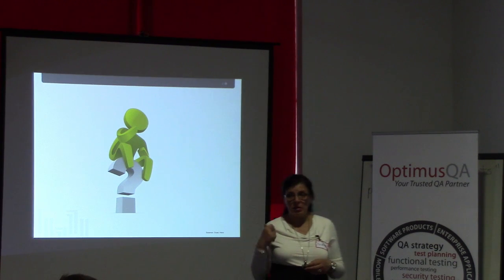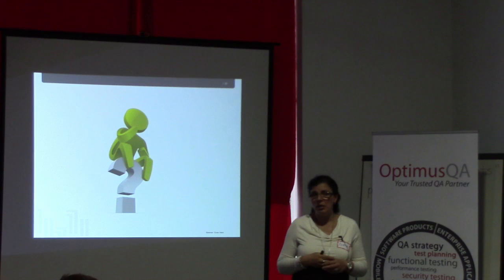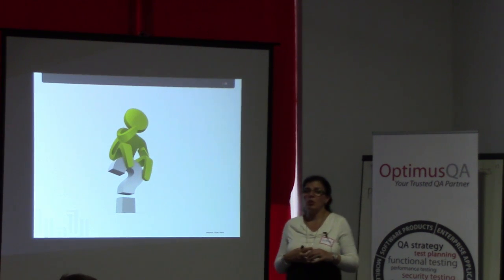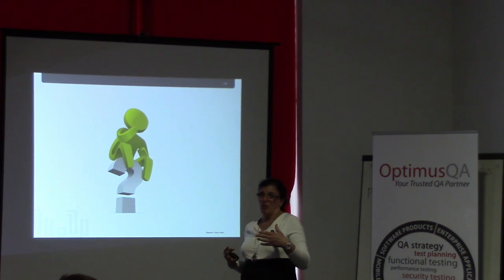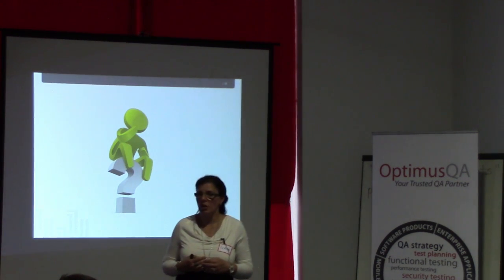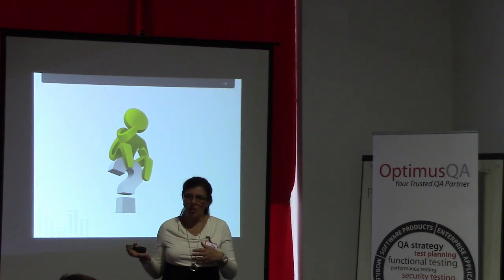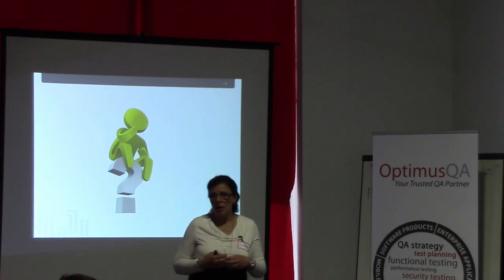Because support work happens together with the project. Then we try to see, sometimes some other projects might have less than 120 hours, so they might have only 50 hours of demand. So I can then say, well, you're going to be working 50 hours on this project and then 70 hours on support for this month. But we do